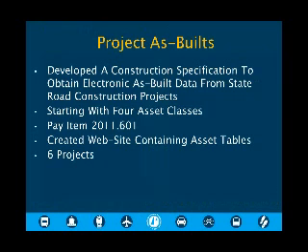All right, thanks, Brad. Another effort we have is to obtain as-built via construction projects. As I described earlier, our budgets are staying the same and our roadway system is growing, so we need to be as efficient as possible. So what we did here is we established one unified specification and pay item that is going to be added hopefully to all of our construction projects in the Metro District.